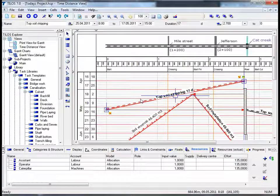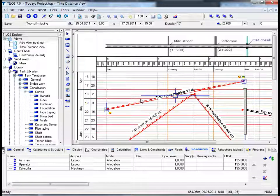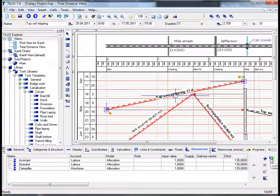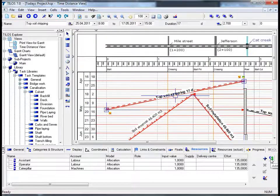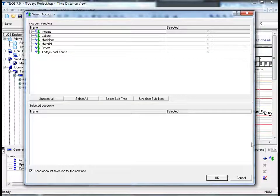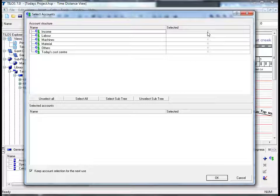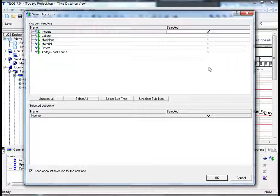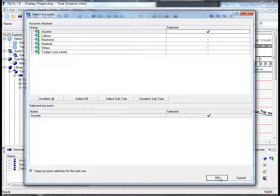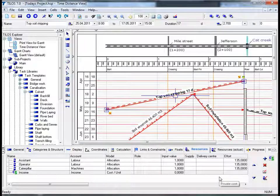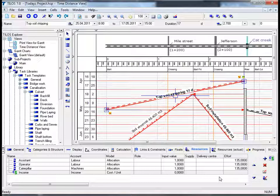Tylos also enables you to handle direct cost assignments without resources by clicking on the euro and dollar symbol in the details toolbar. We can then select an account structure from the list above simply by ticking one of the boxes. In this specific case we will choose the income field, and by confirming this by pressing OK, we can now see that the income has been added to our list in the resources view tab.